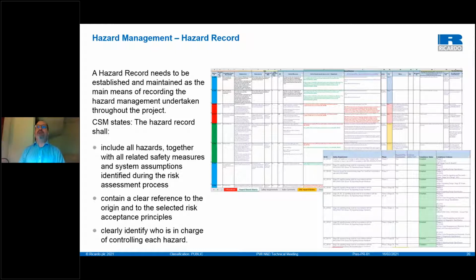define what the evidence should be, and verify that evidence has been collated. And the smaller spreadsheet extract here shows the safety requirements, which is a tab that enables you to manage your safety requirements and demonstrate that compliance has been met within those safety requirements. These can be large documents with many tabs, and it's often a full-time job to maintain these for larger projects.